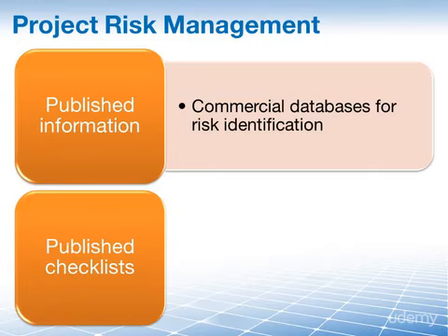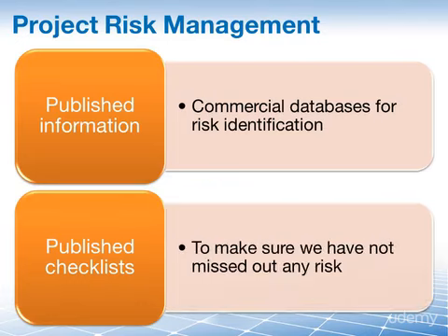And yes, there are also published checklists available that you can use for your specific industry, and these will allow you to go through your processes, go through your project, and help identify possible risks on your project. Let's not forget that these do not necessarily have to be external. Your organization could have such a checklist. You could have a checklist from a previous similar project. You as the project manager can use and adapt it for your project to use it in identifying possible risks.